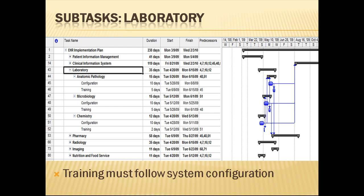Here we can see the subtasks from the laboratory column. The Gantt chart on the right shows the breakdown of the subtasks in purple and links them to the next dependent task with arrows. The different subtasks here are anatomic pathology, microbiology, and chemistry. For example, anatomic pathology is dependent on the configuration of microbiology and chemistry, so rows 48 and 51 are inputted into the predecessors column.